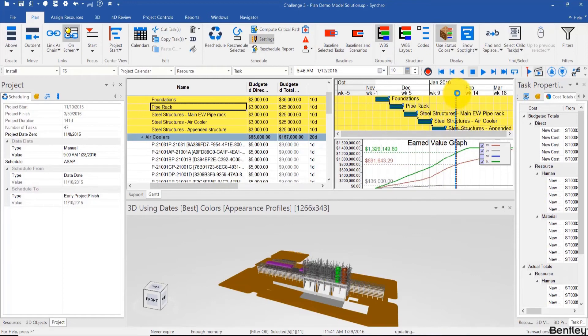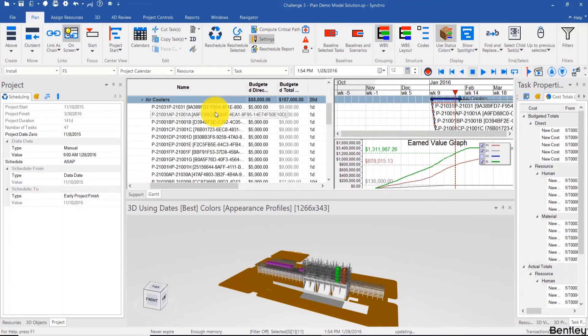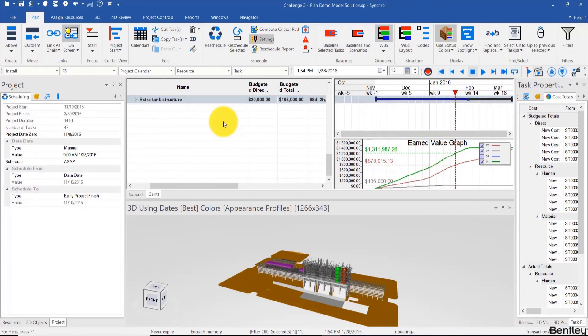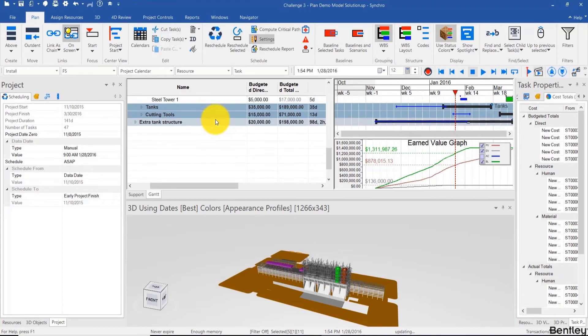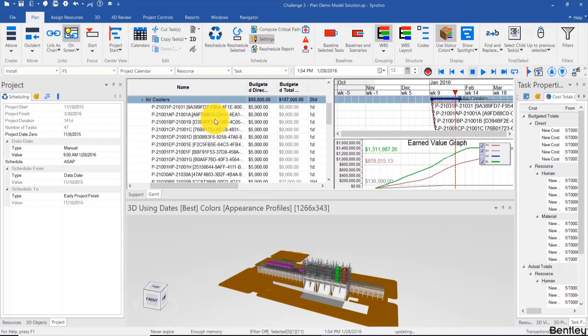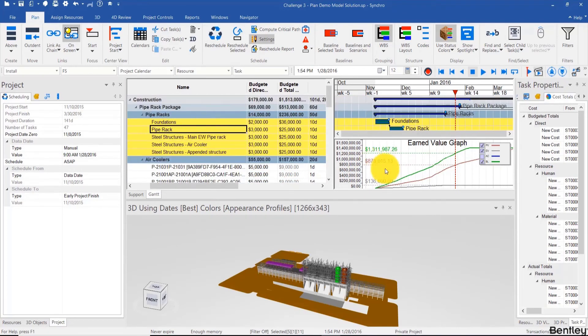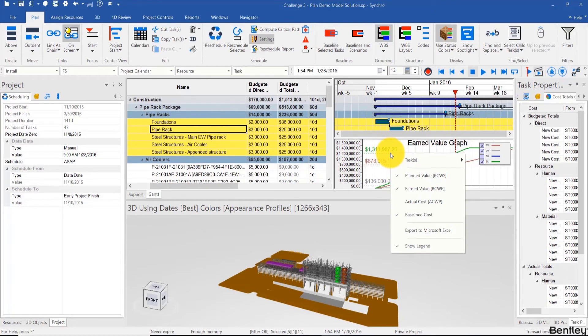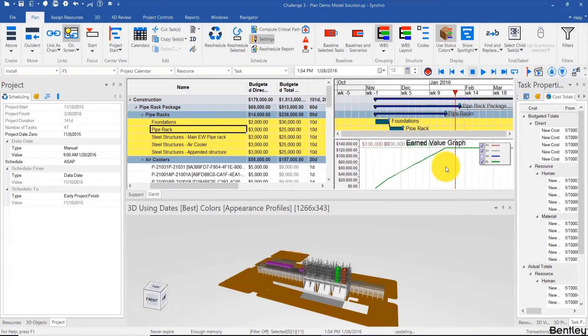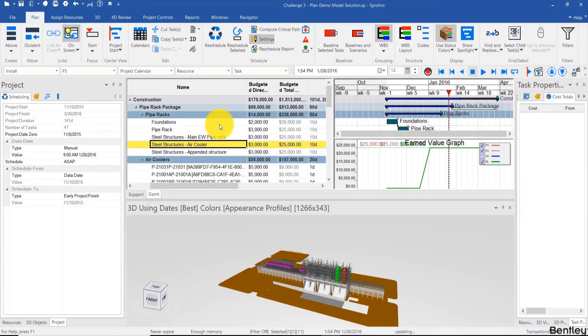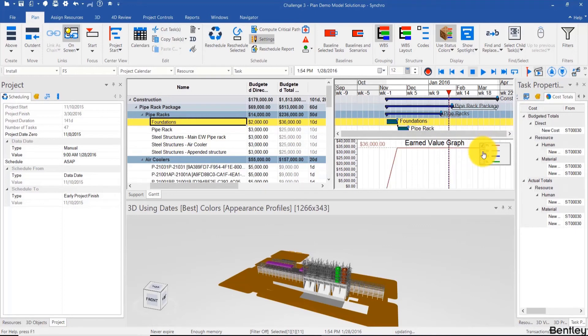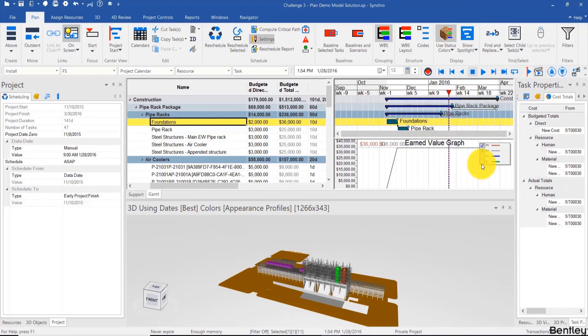Now another question will come up: why is the earned value graph up until the data date different than the planned value, although we started them exactly on the same dates? That's because there are other activities that fall in that time period that are contributing to that planned value. So if I show that graph, for example, only for the selected tasks, the earned value becomes very similar. They're actually all very similar, but if we show them one by one, the earned value is overlapping exactly with the planned value because we chose the exact dates.